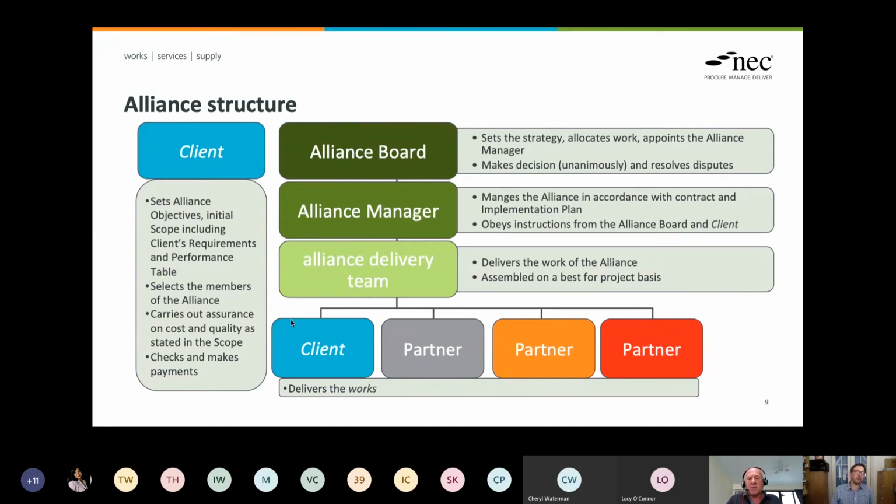If you remember last week, we looked at the performance table, which I'm really liking actually in the world of NEC, and I see perhaps in future editions getting rid of things like delay damages and low performance damages and the like, and consolidating them all into a performance table. It works really well. The only downside is that it's both incentives and disincentives.